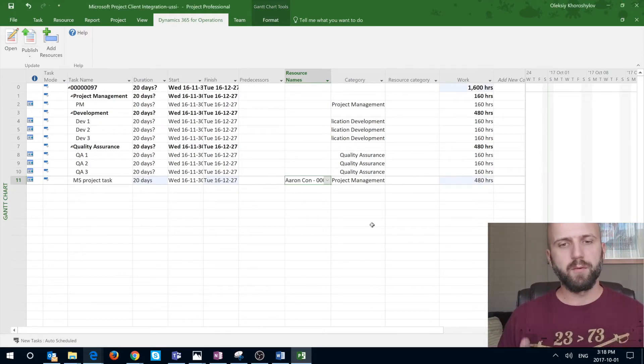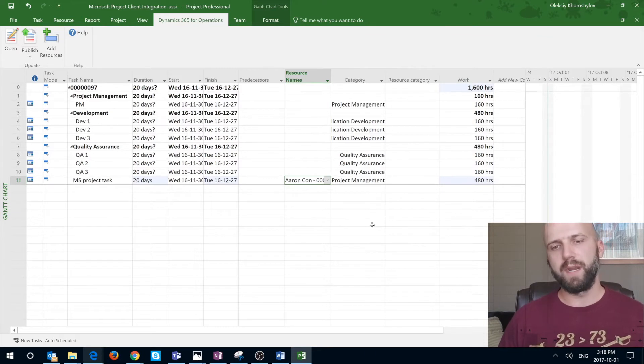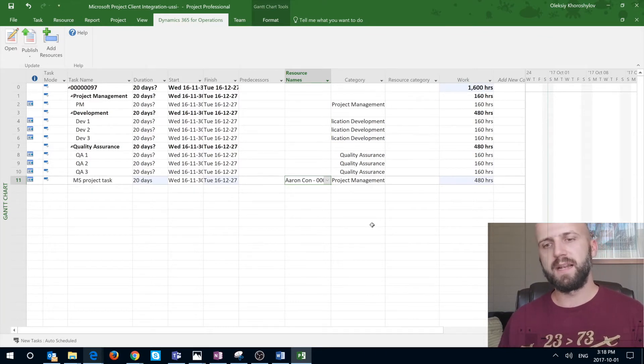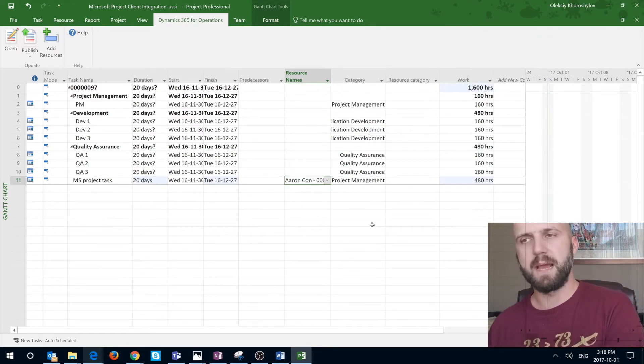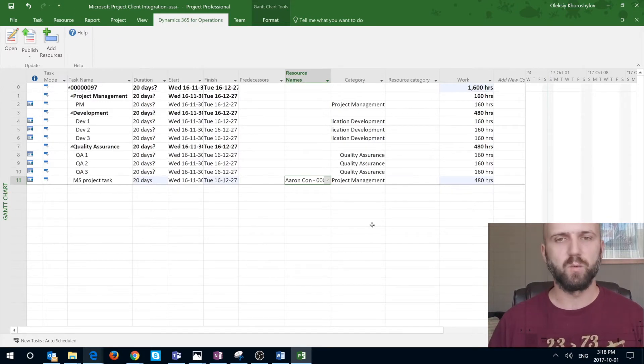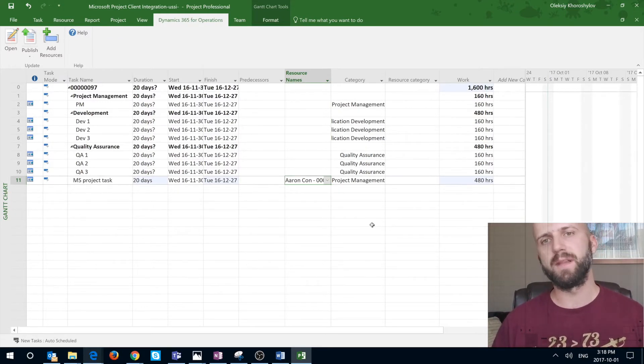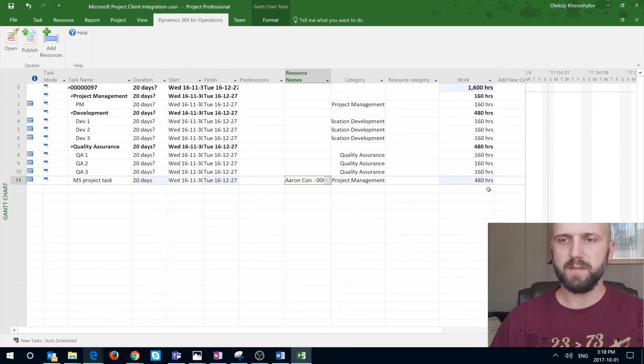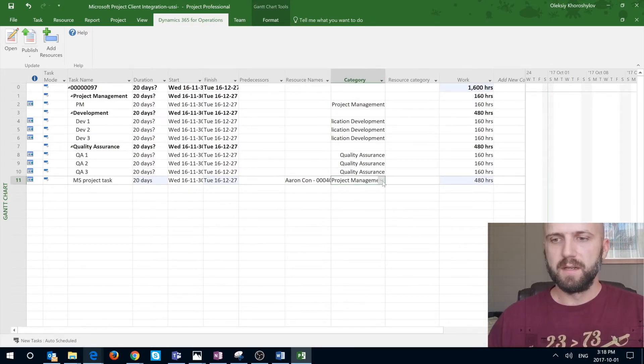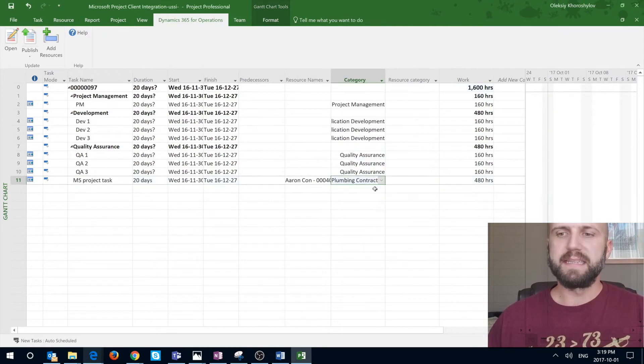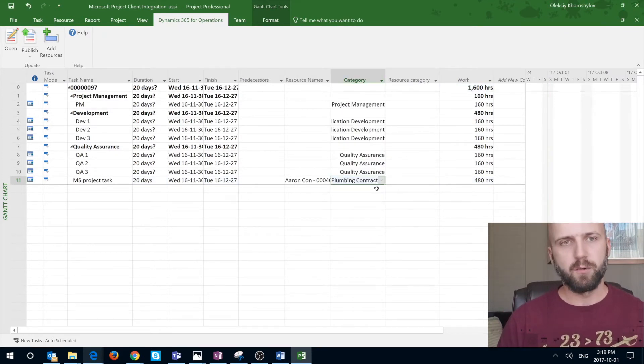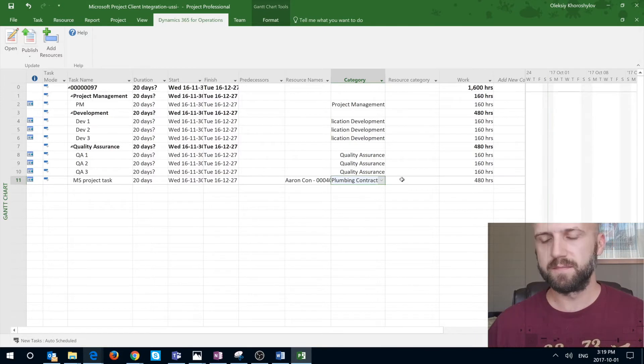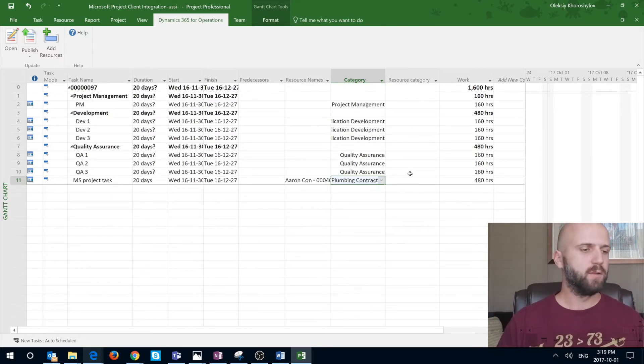So now our newly created task has the name. We define the duration, the start and end date. We can also assign the resources from Dynamics 365. That list that we saw was actually employee list from Dynamics 365 from my US consulting company. We can also select the category. Keep in mind that the categories are not really linked to the project categories in Dynamics 365. Once you're happy with that task, now it's time to publish.